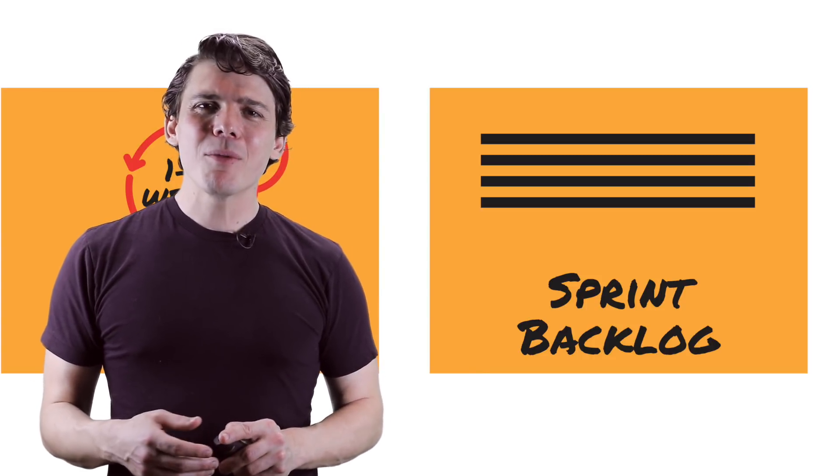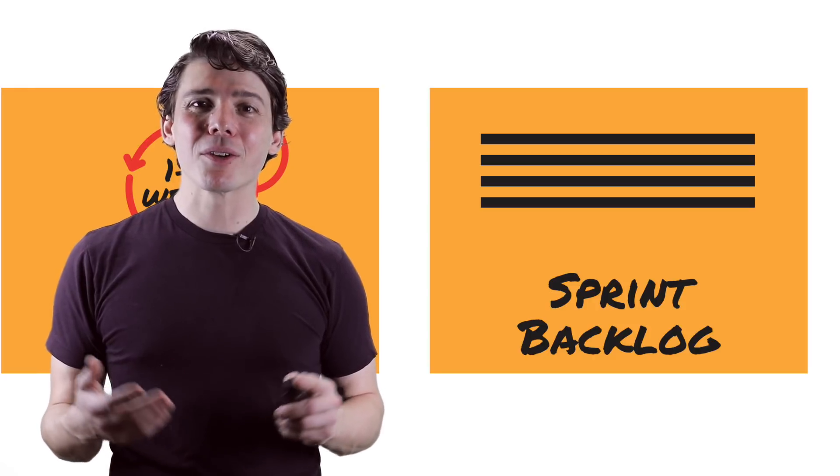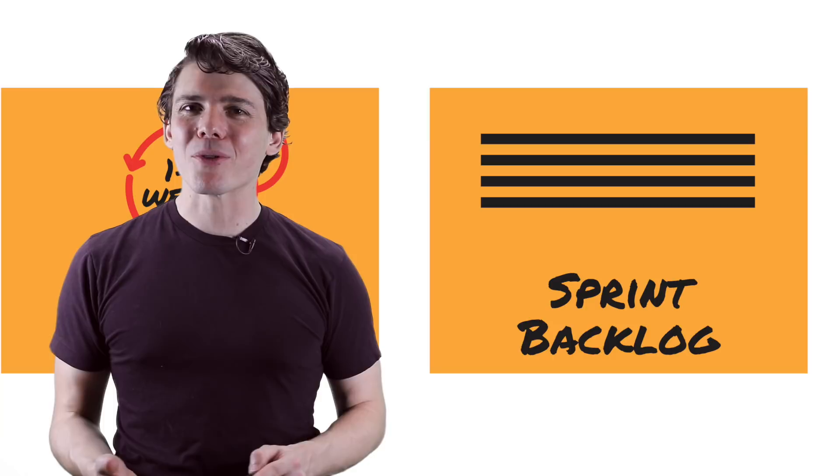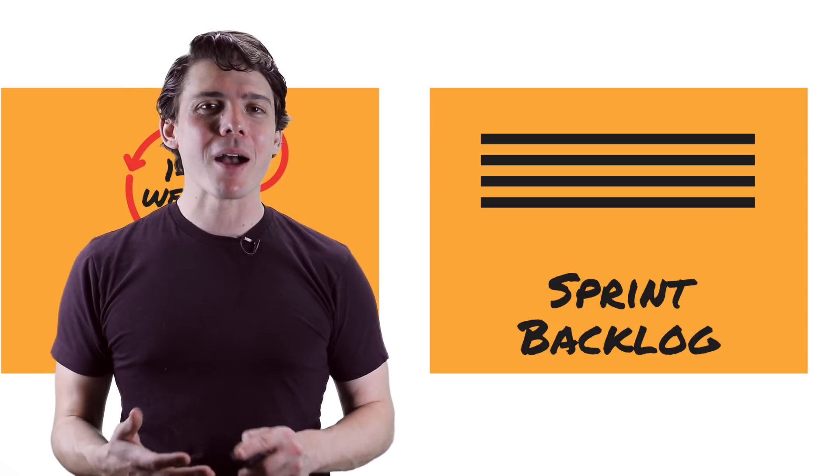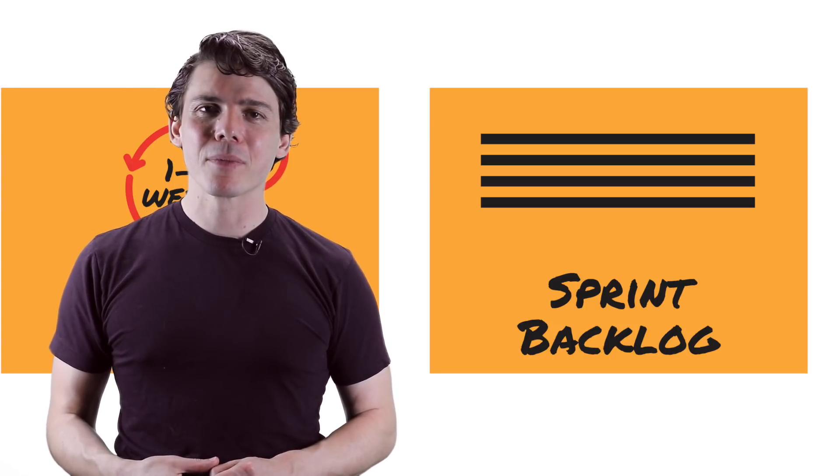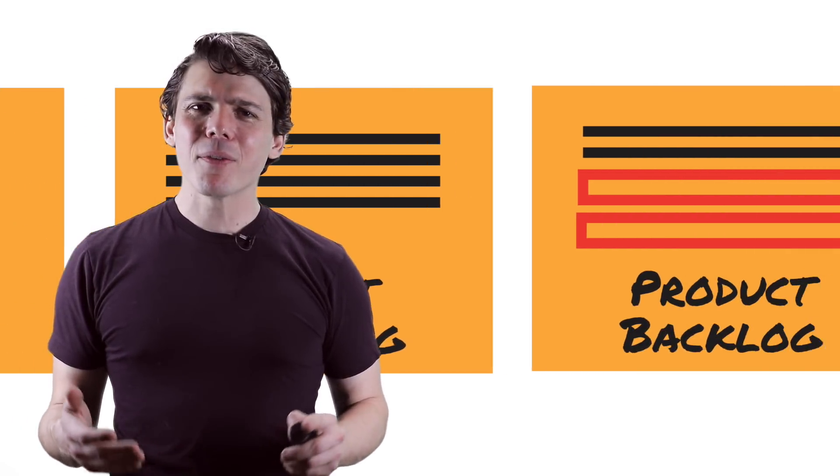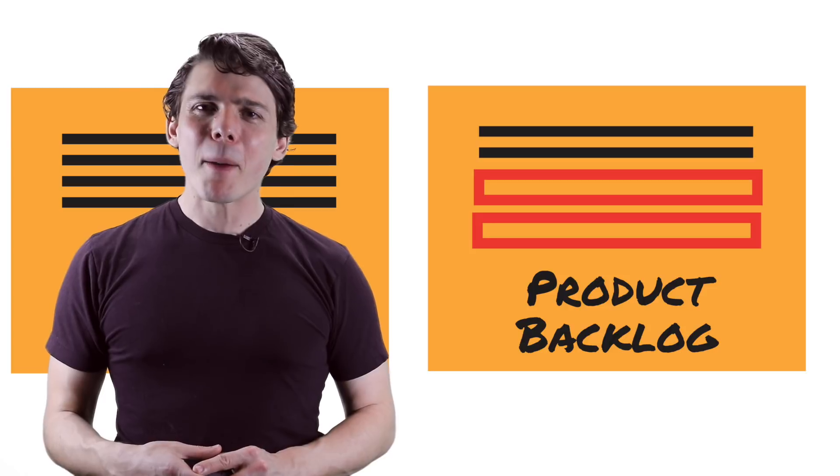That said, the team should feel comfortable committing to the sprint goal, which should be written in such a way that it can be accomplished even if not all the items in the sprint backlog are completed.